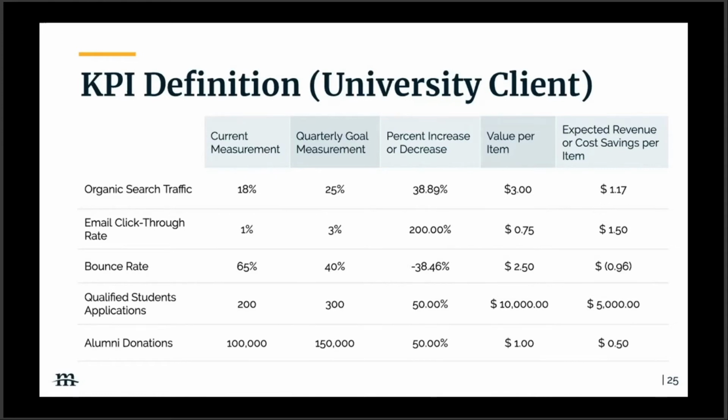So I challenge you today to utilize the kit that we're providing and see if you can benchmark some of your key KPIs, put a % growth on them that you feel is reasonable and attainable, and then use that to help drive the underlying top line or bottom line number to help support the ask in the investment that you're making. So if you invest $200,000, but it returns $400,000 after the project, that's a very good thing. And again, it'll really help facilitate approval of the project.